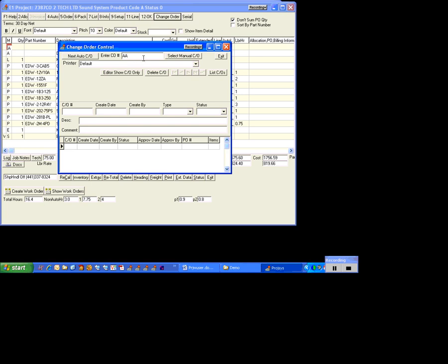for change order AA. And we can give it a description, and this is swap out speakers. We can also put in a longer description down here if we want, and there we go. So this is an external change order, i.e. associated with the customer, versus an internal one would be something we're going to do, like swap out a piece of equipment because it's no longer available. And we also have its change order has not been accepted as pending.